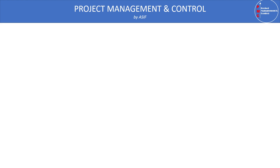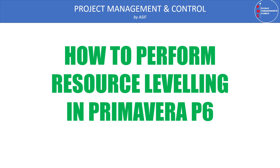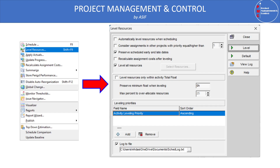You can access the resource leveling dialog box in three ways in Primavera P6. First, press Shift+F9. Normally F9 is common for schedulers to schedule the project, but Shift+F9 brings up the level resources dialog box. You can also click the icon on the main toolbar, or go to the Tools menu where you will find the Resource Leveling option.